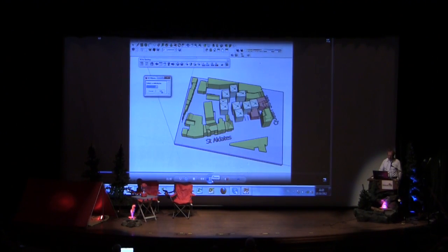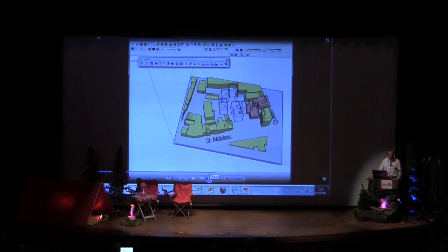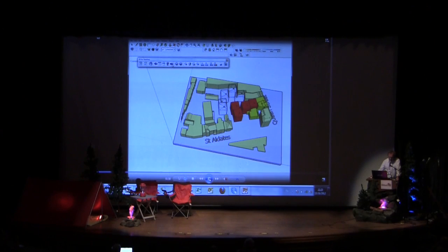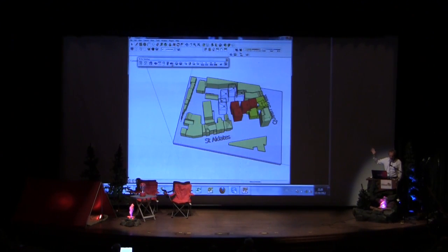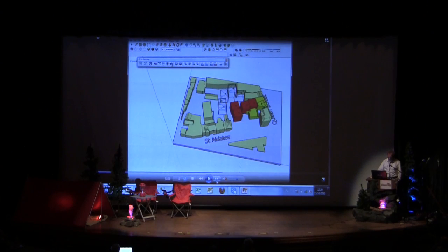We select one, and then we see that the model changes. The model changes according to the activities which have been allocated onto XD objects. And for instance, what you see here is that the yellow parts are demolition parts, and the red ones are construction. Now, as we see here, we have a problem, because construction is going on at the same time as demolition in this case. So it's an abstract model. I've got other models to show you which are more elaborated, but this shows the principle and the idea which is behind. Now, how do we use the coloring?